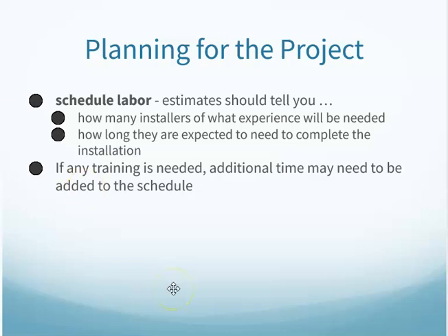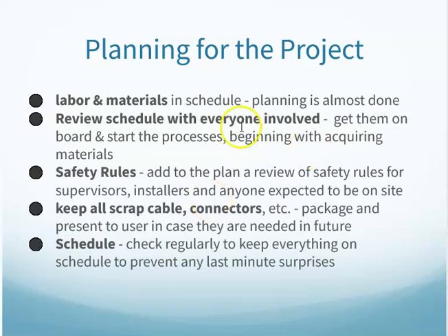You need to schedule labor, how many installers, how long, etc. If any training is needed on the front end for the job, that needs to be planned for. Labor and materials in the schedule, planning is almost done at that point. Review the schedule with everyone involved so they know. Discuss safety rules if there are any special safety rules for that site.